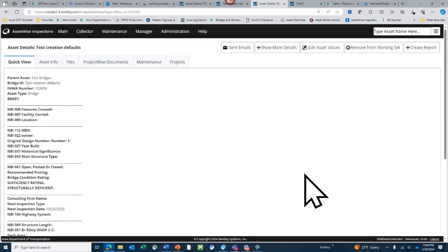Yeah. I know Scott's going to encourage you to do it, but when it comes down to it, as he said, the ratings and the dates need to be done now. That way, you know when your next inspections are due. For scheduling inspections, the dates really are important. Very important, because your next inspection is going to be scheduled based on the SNBI data, not the old NBI data. Right. We just need the NBI 90 date for the 2025 submittal. Yep. And you don't want bridges to look like they're late in the '25 submittal either. So that's why it's so important.